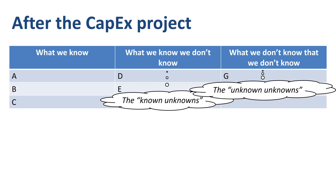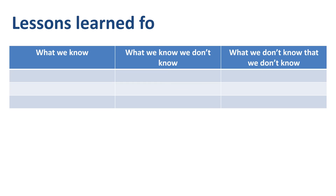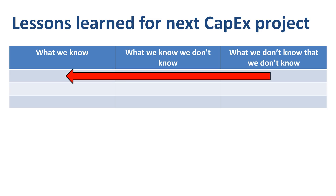The main benefit of doing a retrospective on a CAPEX project is to summarize the lessons learned in the previous project before you embark on your next project — transferring what you learned about things you didn't know that you didn't know into the columns of what you now know, or what you now know that you don't know, for your next project.